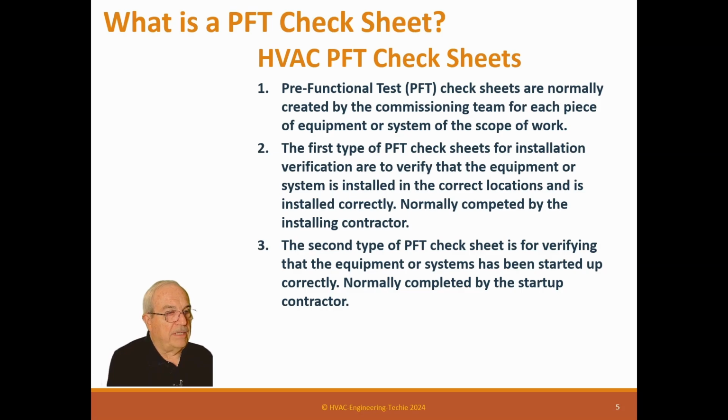And we provide that startup data sheet. We're not trying to take the place of a manufacturer startup requirement, but what we are trying to do is gather a bunch of data. So we ask for the startup data to be in the sheet, and we explain to the contractors how to collect the data and what the data should look like.